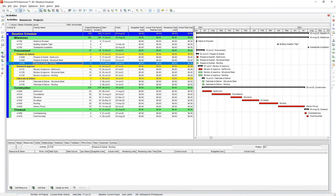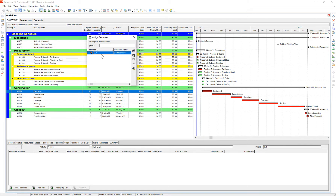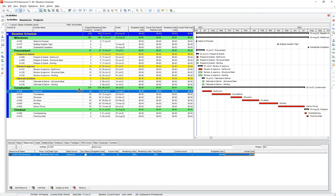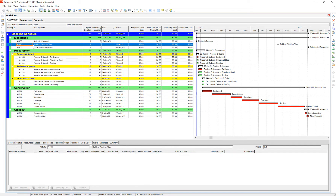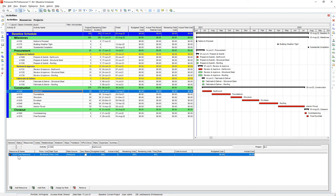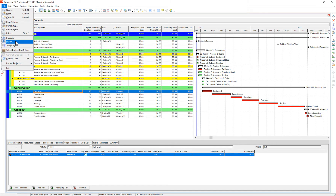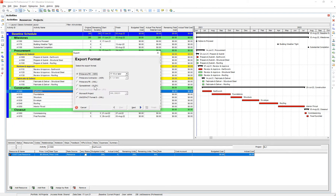So now let's go back to our file. I'm going to assign this resource to just one of the activities that I'm going to cost load. That's going to allow me — because I'm going to export this file from P6 into Excel — to create a template that I can copy information from my Excel cost file into. That'll allow me to know what resource ID I'm going to use when assigning that cost to everything else. A little confusing, but it'll make sense in a minute.